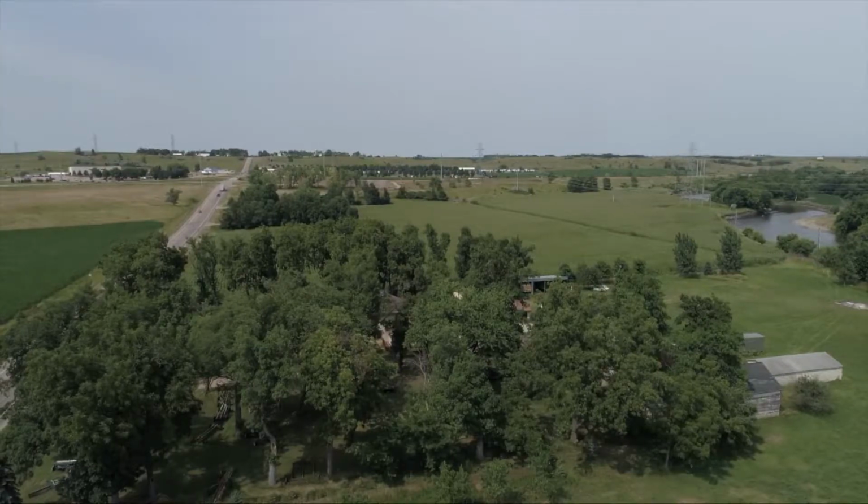The interchange itself will be fully open in 2018. We won't touch the interchange. So in 2018, we'll start the project and build on that. In 2019, we will focus on the interchange at 402. The interchange itself will be open to traffic, but we will be closing the bridge itself and rebuilding that. That interim completion date is October of 2019. And then an overall roadway open, work complete would be in August of 2020.